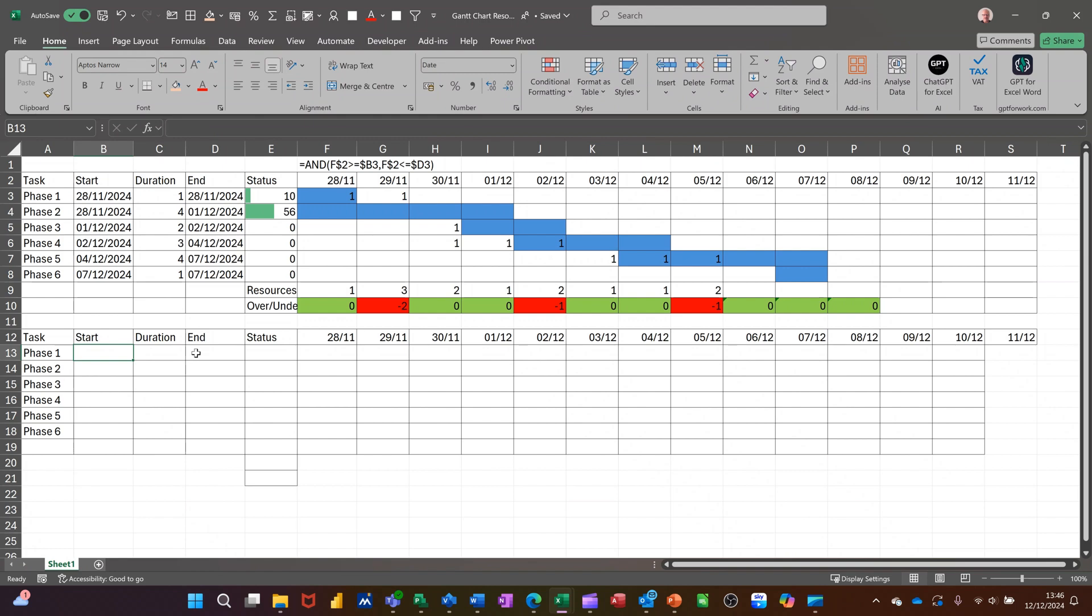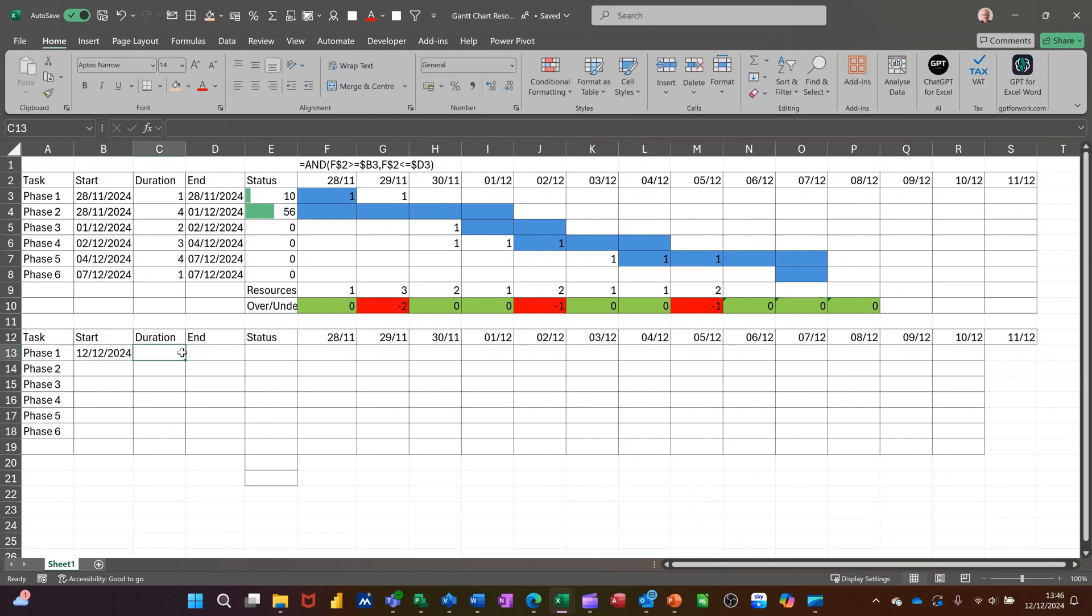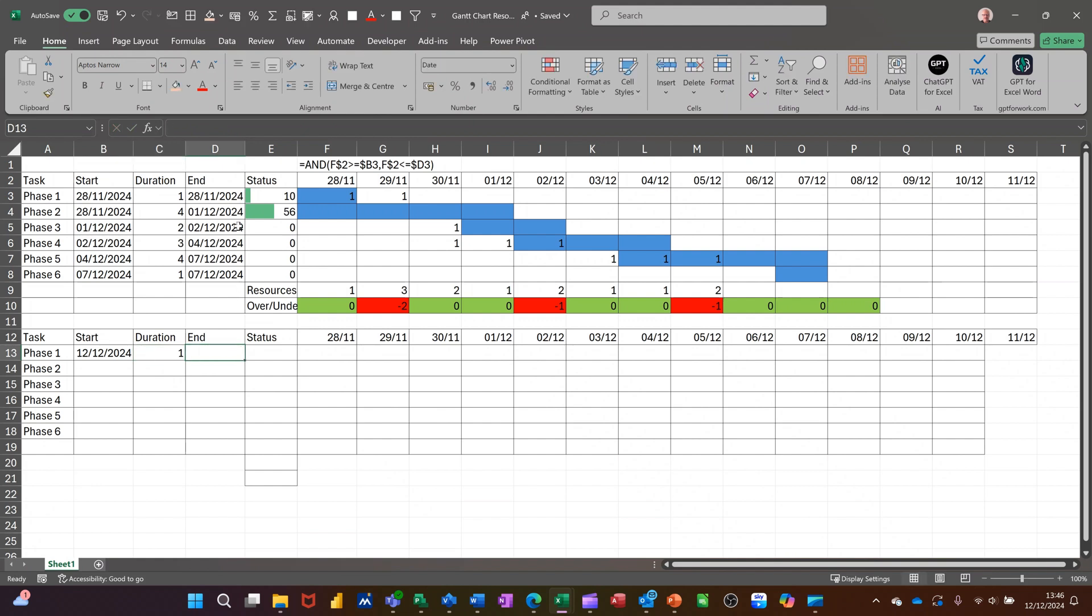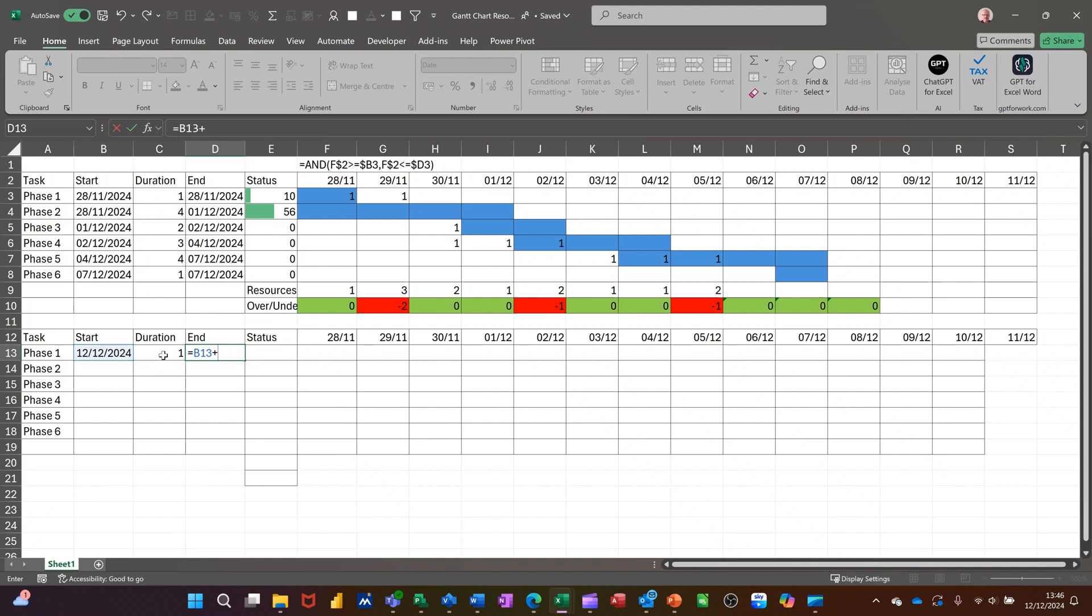So start date on this one. I'll do today's date. And duration is one day. And then basically what you've got there is a formula. So it's just going to be equals that plus that. And then I've got to do a minus one on it because the way it works. So I'll just do minus one and then tick that.